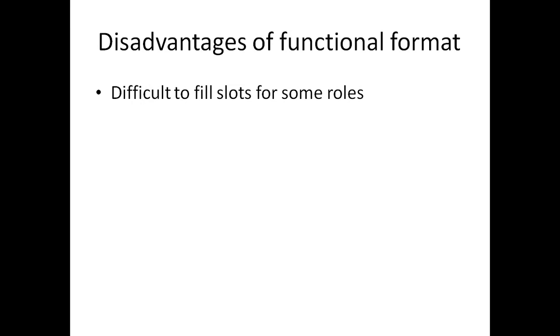In some cases, like the maintenance team, the maintenance team will be performing maintenance of different softwares. The testing team will be performing only testing of different projects in the case of functional format. So there will be a shortage of people in certain roles like maintenance and testing. Since skilled developers or skilled teams won't be available in the case of maintenance or testing or coding groups, we require skilled people. So those people may not be available. So that's a problem with this functional formatting.